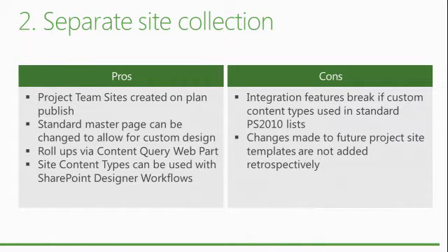Now the benefit that you get from using a site content type, and for those of you who have used SharePoint in the room, hopefully this is ringing true, is that you can define one content type to define what a risk means. Those columns will be attached to that content type, and they will be the same for all sites that content type is attached to.